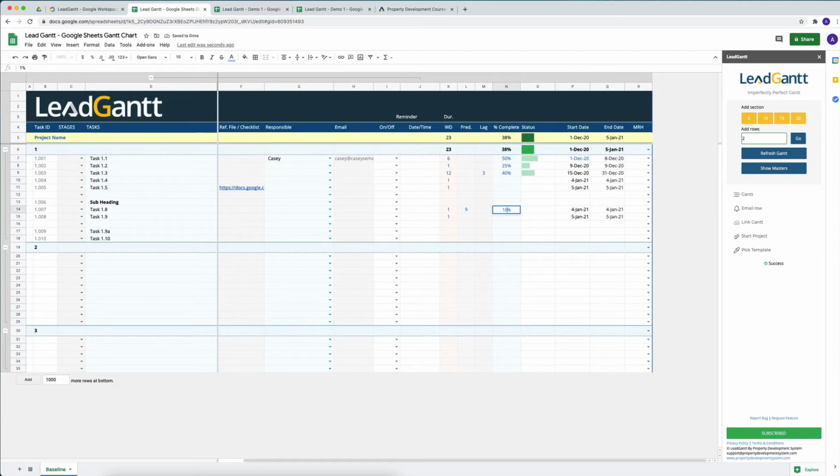It's 50% complete, or 25% complete, or 40% complete. Then you've got this, which is 100% complete, and it will keep updating every section based on the completion for those tasks. So just remember that anytime you enter the task over here, you need to enter the work days for it before it can be updated. If there are no work days, number of days that it's going to take to complete the task, these dates will not get calculated automatically.